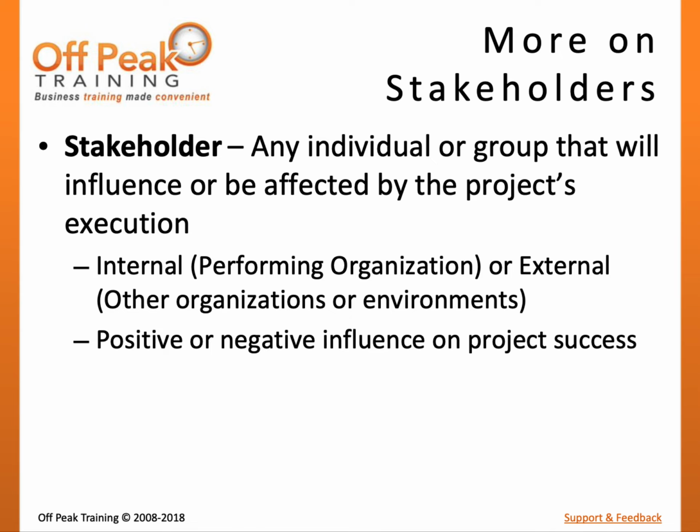While some stakeholders may want to help the project succeed, others may have a different opinion. Consider a project to build a new low-emissions power plant. Some stakeholders may support the project based on the jobs it will create and the value it will add to the community. Other stakeholders may dislike the location, appearance, increased taxes, or potential traffic and want to prevent the project from being successful.